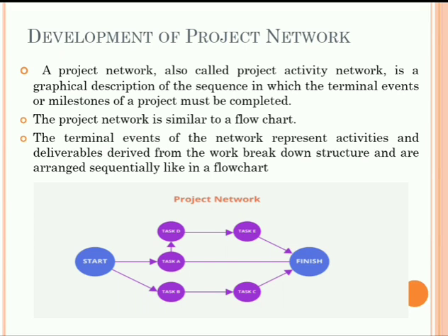Always use straight arrows. Don't draw tilted arrows or zigzag arrows. You have to use only straight arrows. Avoid crisscrossing arrows. You have to use the minimum number of dummies also. The arrows should be used from left to right only, and right to left arrows should not be used.